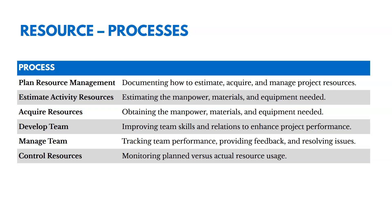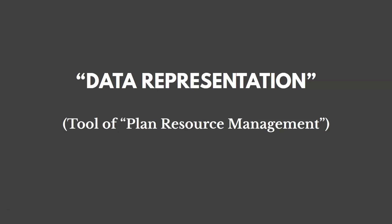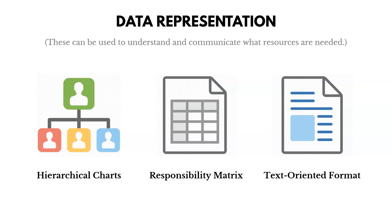Throughout this chapter, we'll talk about several tools and techniques. One is data representation, which is a tool or technique of plan resource management — documenting how to get the resources we need. This includes an organizational chart showing the hierarchy of who you need, a responsibility chart, and role descriptions with detailed descriptions of what people are planned to do.